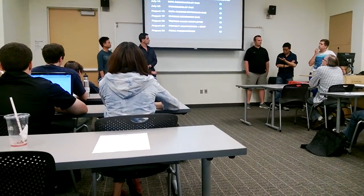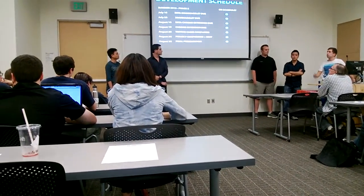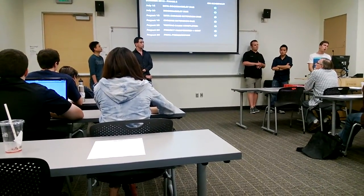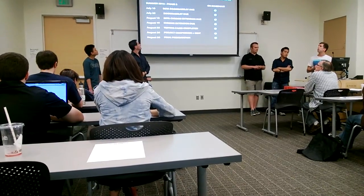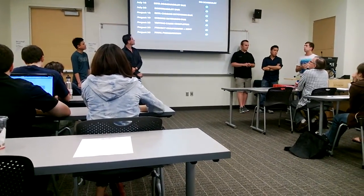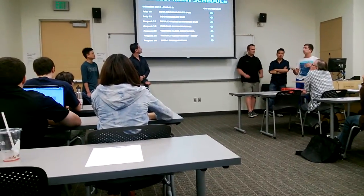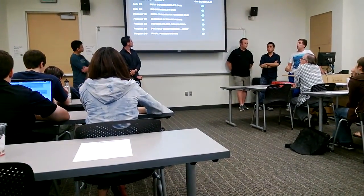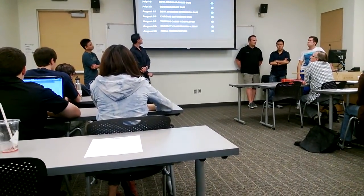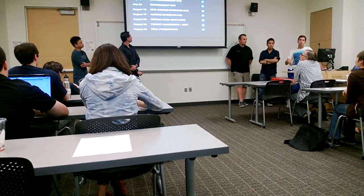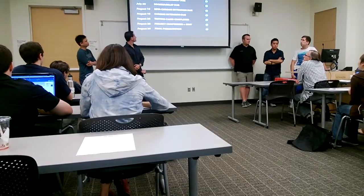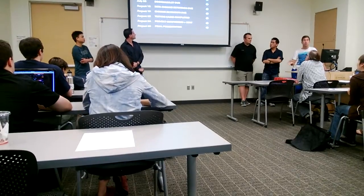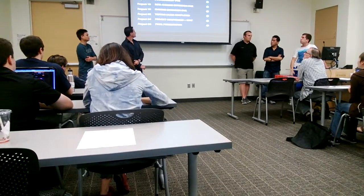Our development schedule is almost identical to what we presented during the midterm, except we added the completion and presentation portion. July 15th, a beta of the bookmarklet was due and completed. July 22nd, bookmarklet version 1.0 was due. August 12th, the beta Chrome extension was due. August 19th, the final Chrome extension version 1.0 was due. We beat all these deadlines by about a week, which gave us additional time for testing, which turned out to be extremely necessary.